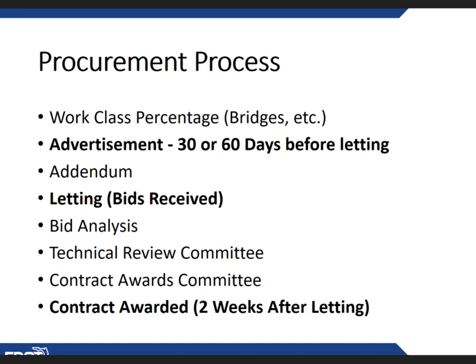A project can be let in the central office or district. And if this project is let in central office, all of the plan specs, documents, and estimates information is transferred to Tallahassee. We have a final plan section that reviews the project. They secure the funding, and then the project is passed along to the contracts office. And we know that the work class must be determined before we advertise that particular project.